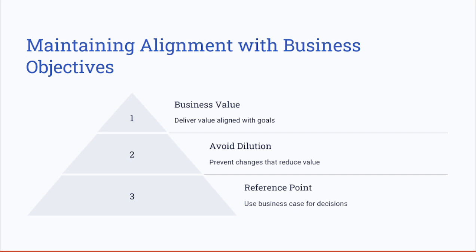You remember all of these requirements from when you initiated the business case, where you aligned all of these requirements, or the idea of the project, with the overall project objectives and the organizational goals. So if there are any changes to the scope, ensure you go back to the business case as a reference point in case you decide to make any scope changes that misalign the project goals with the organization's objectives.